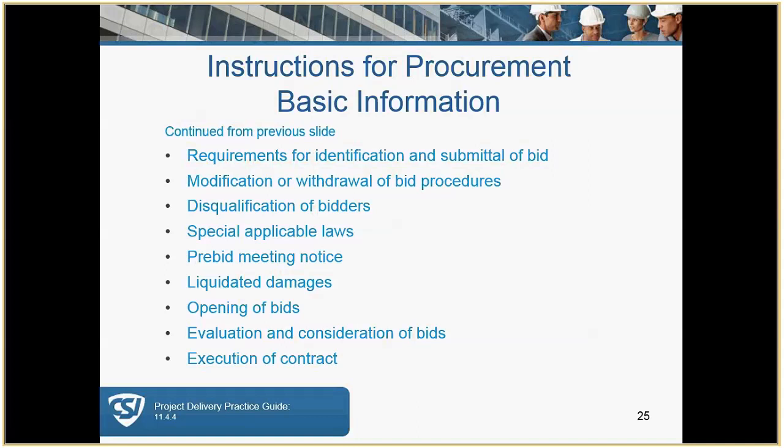But you also need to make sure that it's simple enough as to not disqualify a single one or even multiple bidders for misunderstanding what you're writing in your bidding or procurement requirements. Out of all the sections of the specifications, this is the one that you really need to spend the most amount of time on, because nothing's more embarrassing than to be there at bid opening and have all the bidders misread, or a good portion of them misread what your intention was.